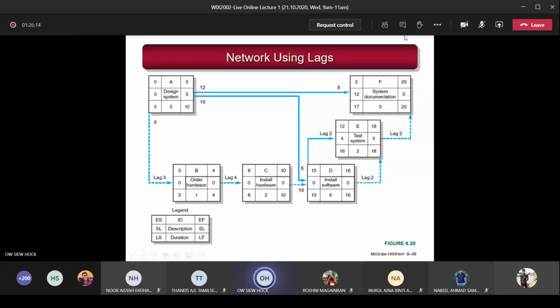So now the forward pass is finished. Now you do the backward pass. It's the same thing, okay? So here you take 20, you put 20 here. 20 minus 3 is 17, right? Okay? So now you're supposed to bring the 17 over here, right? But this one, remember, is a burst. So you have to compare values, okay?